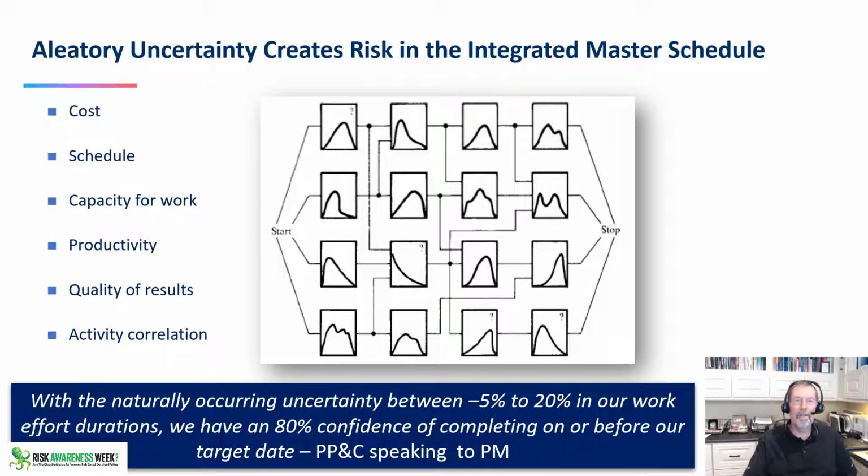And by the way, I just want to go off topic here real quickly. The PERT formula that has 4 times the most likely plus the pessimistic plus the optimistic, divided by 6, is a fake formula. That formula was constructed with the denominator being 6, which is the standard deviation, to convince the Congress of the United States that the Polaris submarine construction would show up on time. And we've got several papers in our references here that speak to that in modern time. So the PERT model, while useful, is not very credible. We want to have a real statistical simulation of our schedule, so it's got to be a Monte Carlo simulation. And there's lots of papers in our references that tell us how to do that. But just remember, PERT is okay as a start, but don't bet a lot of money on it when you're all done.